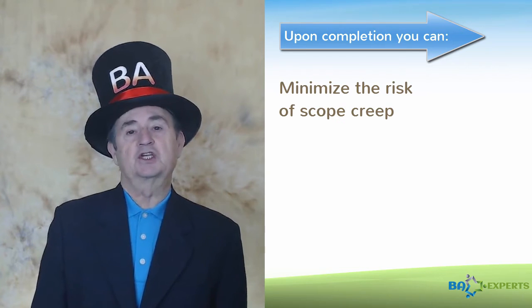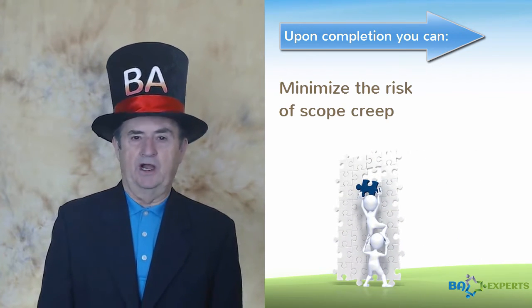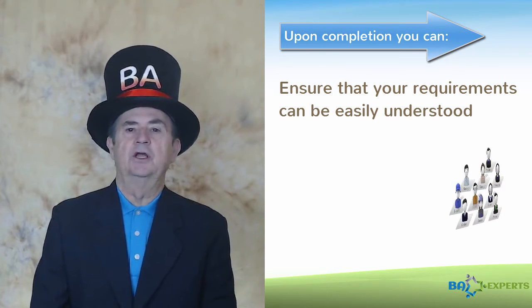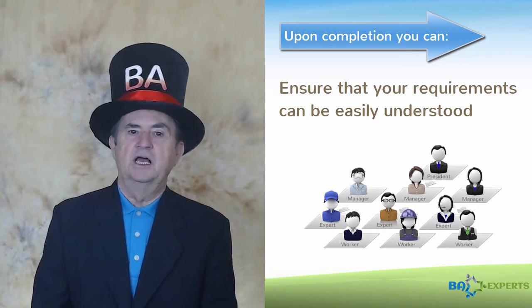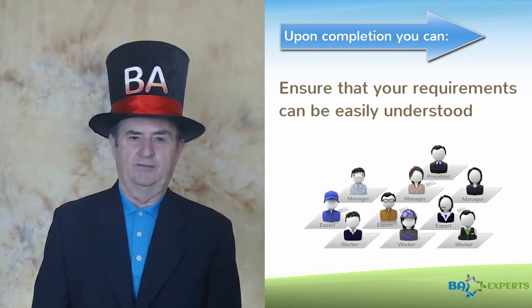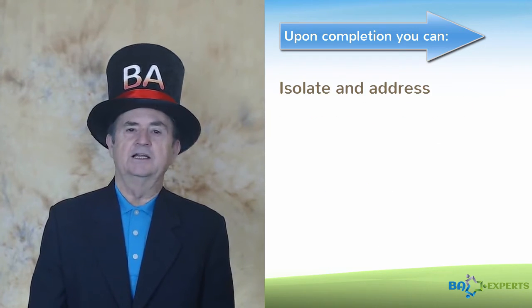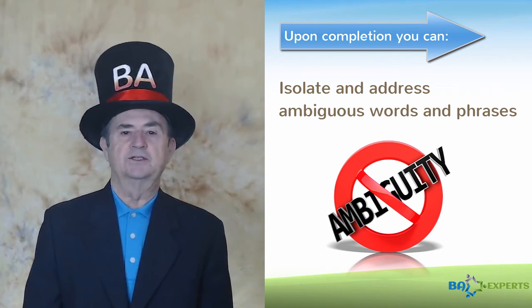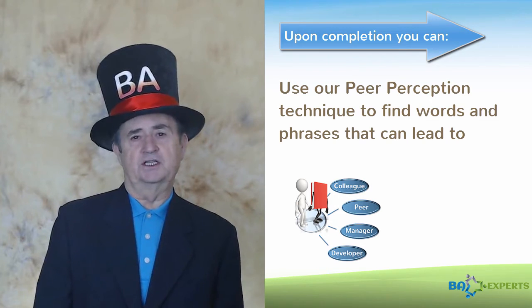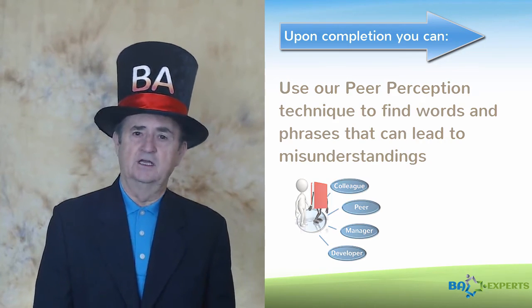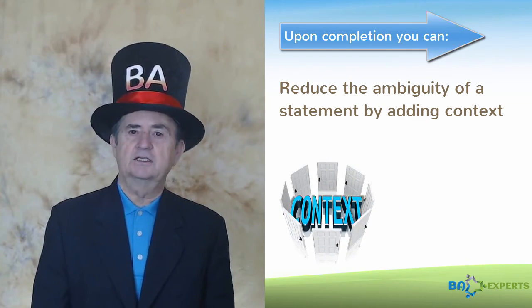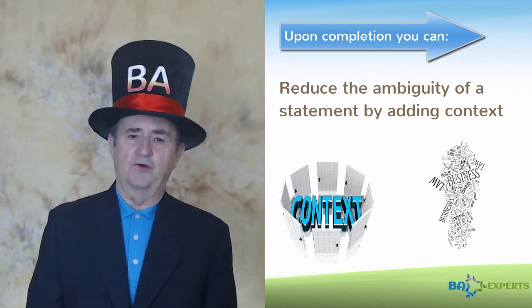Minimize the risk of scope creep caused by missed requirements. Ensure that your requirements can be easily understood by all target audiences and confirm that each audience shares a common understanding of the requirements. Isolate and address ambiguous words and phrases in requirements — use our pure perception technique to find words and phrases that can lead to misunderstandings. Reduce the ambiguity of a statement by adding context and using standard terms and phrases.